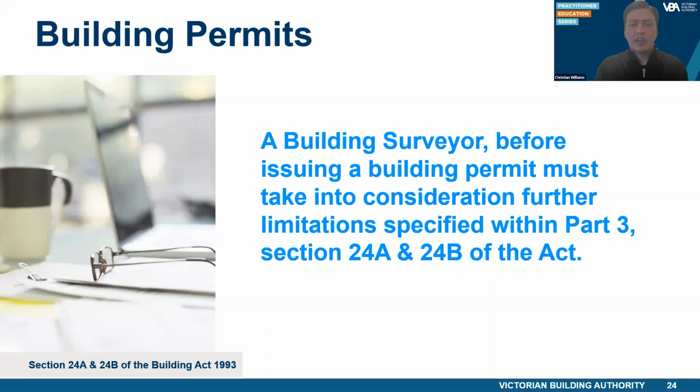In the case of building work carried out under a major domestic building contract for the cost of building work $10,000 or more, if the cost of the building work exceeds the prescribed amount of $16,000, the following names are identical: the person who's named as the builder in the contract, and the name of the person specified as the builder in the certificate of insurance.